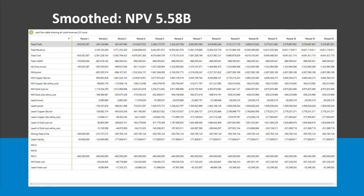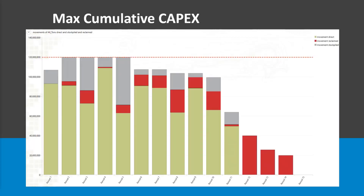Can the software generate a schedule that meets my requirements but also brings down that initial cost without hurting NPV too much? The first thing I tried was putting a max constraint on our cumulative CapEx. I went in and told Scheduler: you can only spend so much on equipment fleets, so much on the mill, and so much on the leach. Is it going to buy a different allocation of processing facilities or a different number of mining units to stay under my CapEx limit of $750 million?